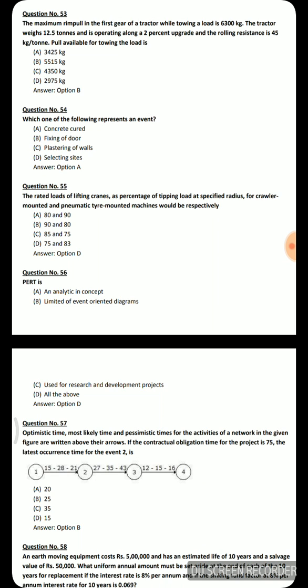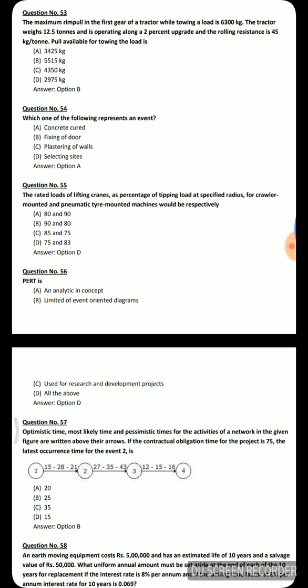Next question: which one of the following represents an event — option A: concrete cured, option B: fixing of door, option C: plastering of walls, option D: selecting sides. Since 'concrete cured' indicates a completed state, option A is the correct answer — it represents an event.